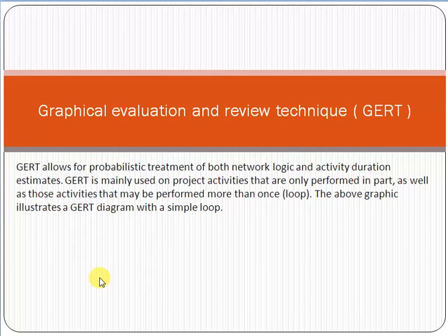For development, approximately 1 month is required, 10 days for testing, and 10 days for deployment. So you can say that in approximately 50 man days you can complete the project, for example. Okay, so friend, in project management, estimation is very important, and GERT is an approach which we use for estimation of tasks. The graphical evaluation and review technique is a method.